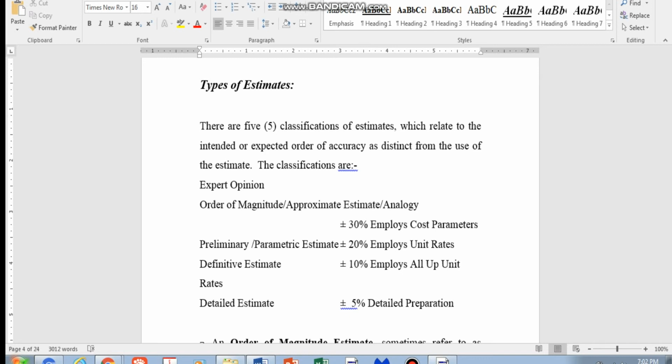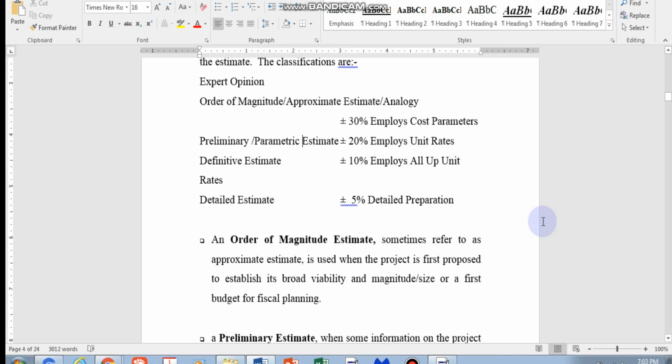Okay, so it's actually a very important stage, and this is really a pre-budget stage. Whatever detailed estimate is produced by the contractor after negotiation, after a lot of back and forth, this will be your budget. So it is the most important item in the engineering arena. Okay, so I'll explain more.